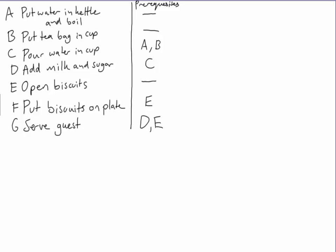Now I'm going to translate that into a network. So I'm going to start from a point over on the left of the page, and I'll label that as start. And then what I'm going to do is I'm going to draw lines to a node, basically. So if you remember that from doing other stuff with networks, A is going to go across here like this. Draw an arrow on the end and label it. So A and B are both required before we can do C. So I'm going to draw them in like this, and they go to a point where C starts.